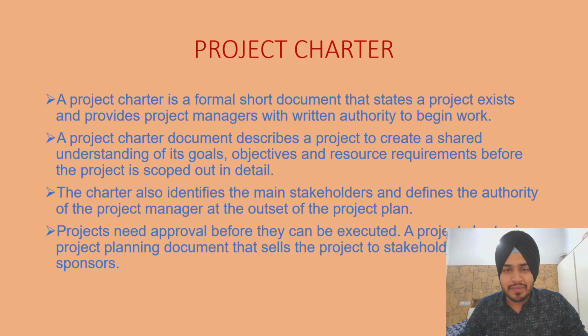The second step of the project plan would be creating a project charter. So let's discuss what a project charter is. A project charter is a formal short document that states a project exists and provides the project manager with written authority to begin work. The project charter is created by a project manager, and business analysts can also help the project manager in creating this document. And this would contain the starting date of the project as well.